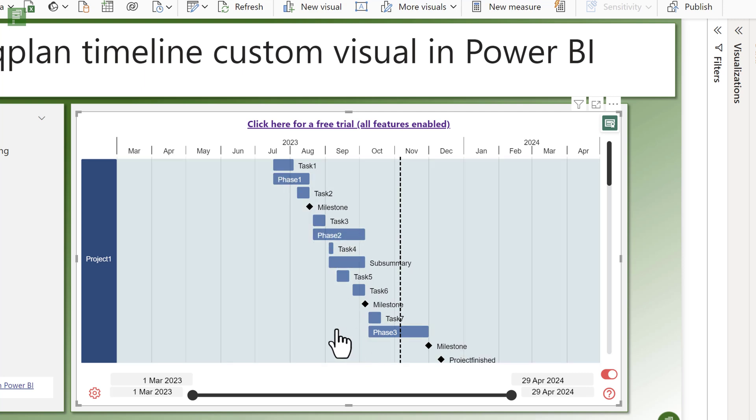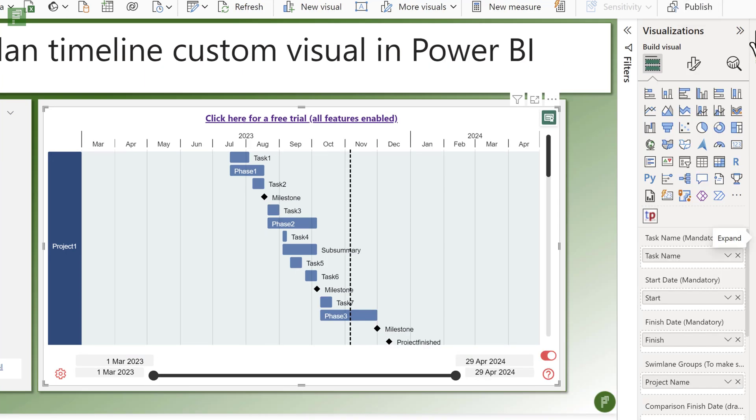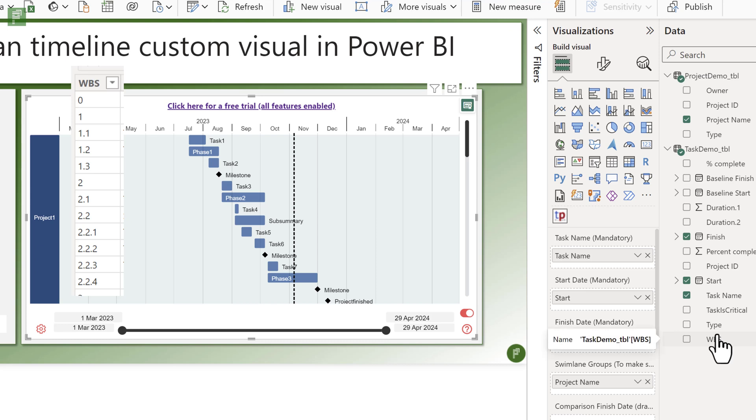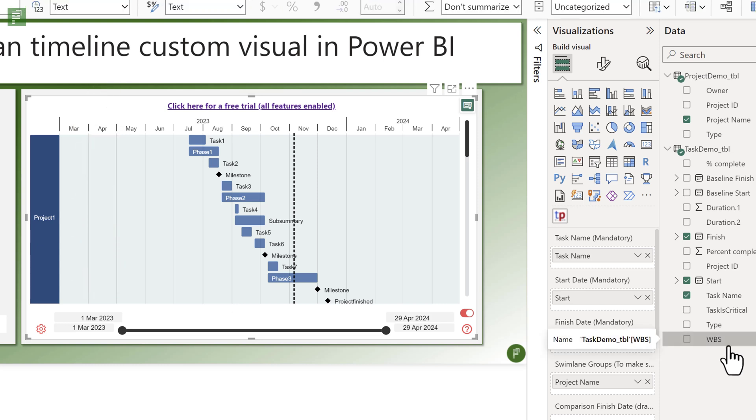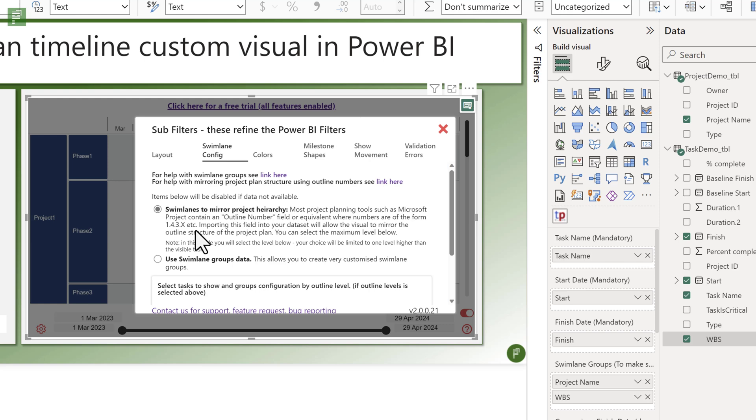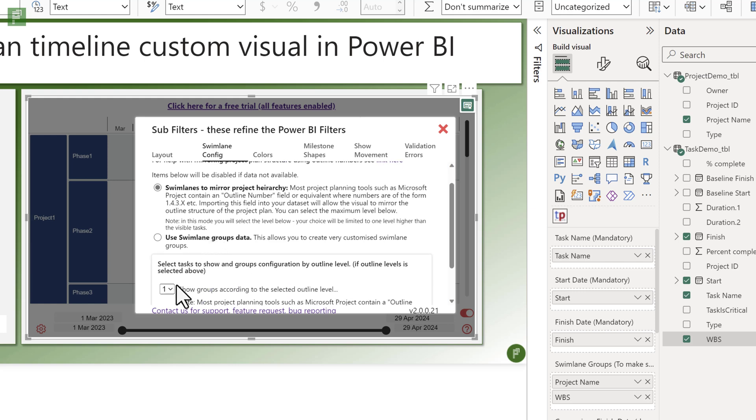Let's take a look at the TrackPlan Timeline where I include the WBS. So the WBS needs to be a text structure in your data because otherwise it won't find the dots inside your WBS and it won't know how to populate your data. So let's pick the WBS and it needs to be the latest thing inside that swimming lane. And now you see that because it has that structure of 1.4.3, it has the option to create swimming lanes to mirror the project hierarchy.